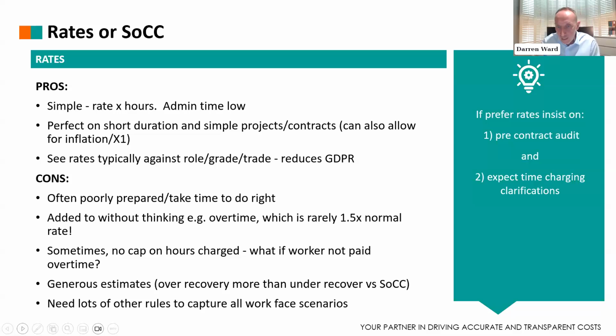Rates for overtime, weekend working. To get it really accurate, you need to think of all those wider scenarios. So if you are going to use rates, and many people do, I always insist on a really thorough pre-contract audit, followed by adding those clarifications on those time charging rules.